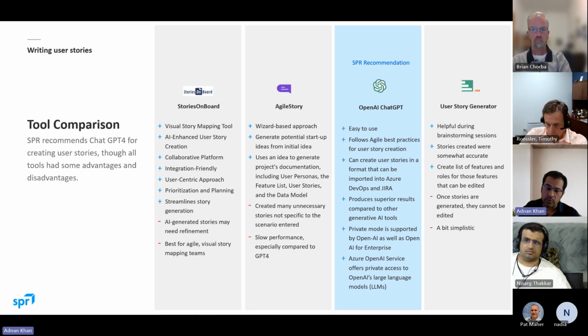So if I go back and ask questions, say it creates 10 stories for me, I don't have to repeat my question. I can just say, explain more on number one, or create sub-stories for number one. And it knew what number one meant. So it was very easy to work with and refine those stories as needed. Even without providing a very detailed prompt, it followed agile best practices, meaning the stories were independent, small, testable, and followed the specific format. And at least in my experience, when I compared it to other tools such as Gemini, it did produce superior results that were more user-friendly.